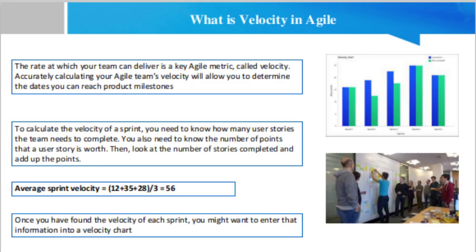Step 2. Predict the number of sprints needed. In this step, you want to assume that your remaining sprints will be similar. Your team can now revise the prediction of when the project will be completed. With this in mind, let's assume the project includes user stories that total 48. To complete the project, you will need a total of 4 sprints.